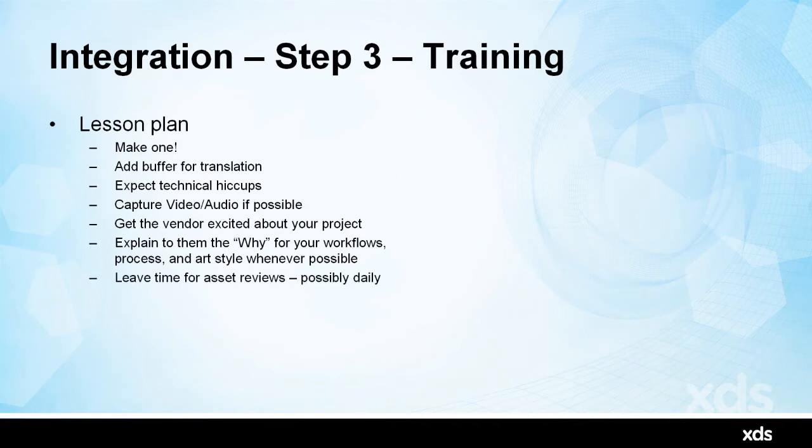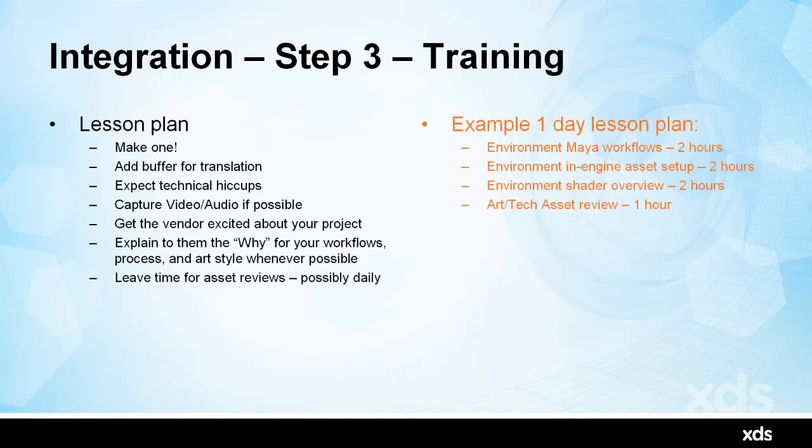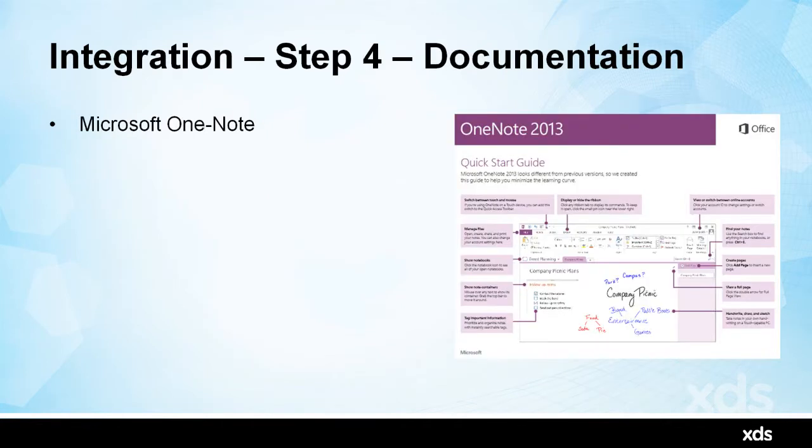And leave time for asset reviews. That's pretty important. So an example of our first day lesson plan when we went over was Maya workflows, 2 hours; in-engine asset setup, 2 hours; environment shader overview, 2 hours, something like that, and then an art tech review at the end of the day. So documentation, really important, again, for fully integrated engagement.